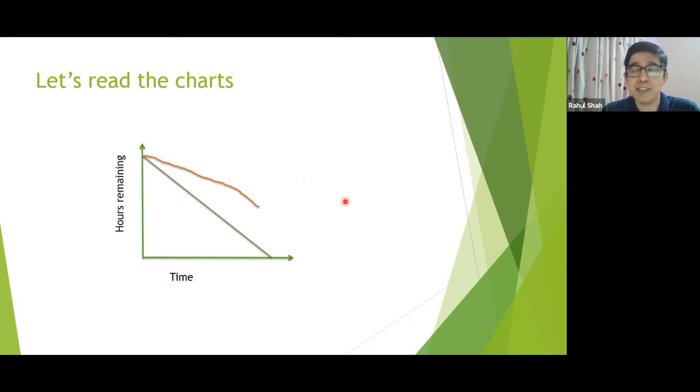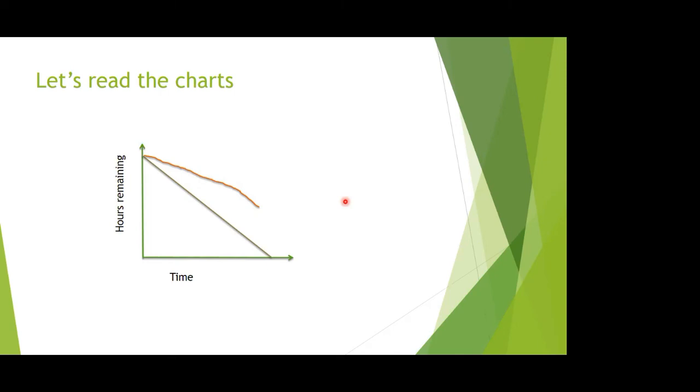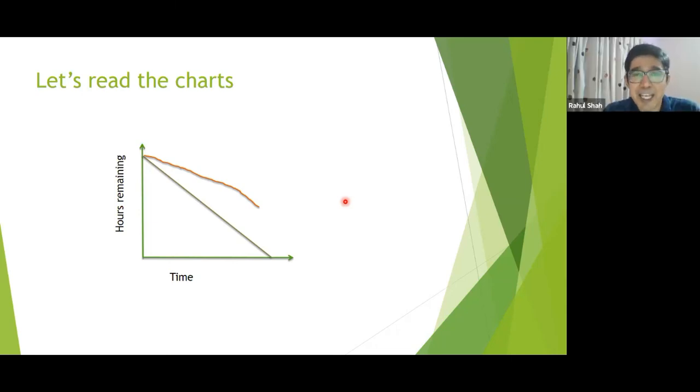Somebody else also was saying something. I was trying to tell, maybe they underestimated initially. That could be one of the reasons. Yes, they underestimated what they can pick up. Very good. Maybe the management is pushing them. Now the team says, okay, we can complete 25. He says, no, you should do 35. And then the team is working. They are going at a rate of 25 story points per sprint, but the commitment, which was whatever management said, is that you should take 35. And then they are not able to meet it.